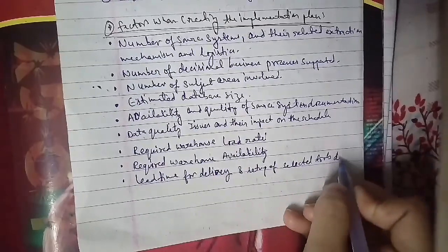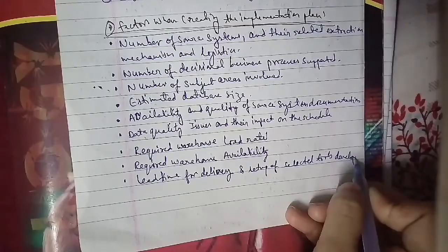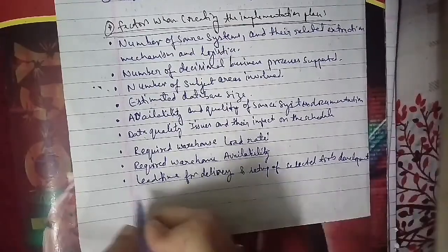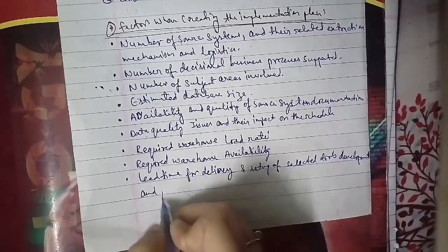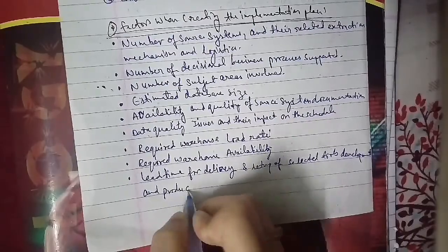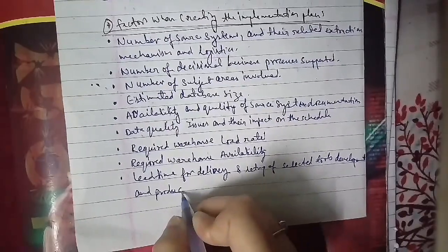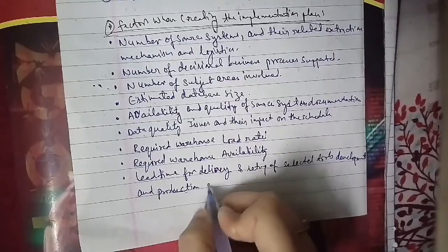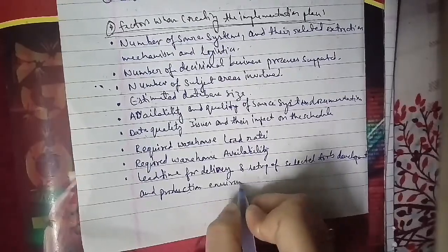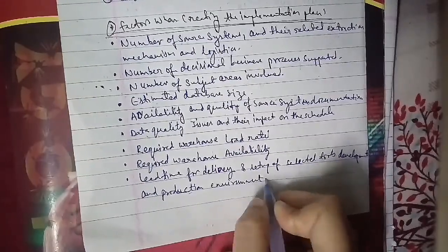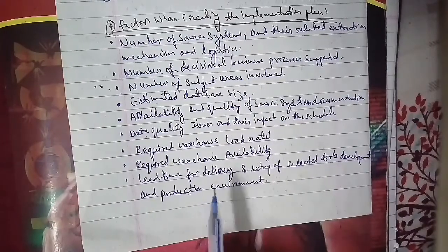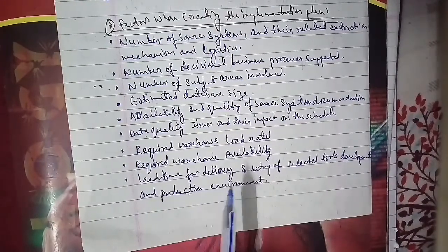Project schedules sometimes fail to consider the length of time required to set up the development and production environment of the warehousing project.